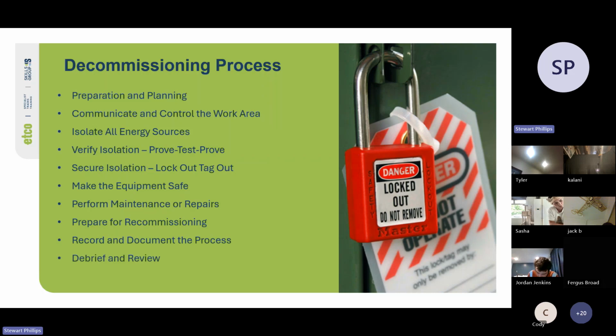And then debrief and review. So analyze the decommissioning process and identify any areas for improvement. Provide feedback. Engage with the team to discuss lessons learned and reinforce best practices. Revise safety protocols or decommissioning plans based on the review findings.